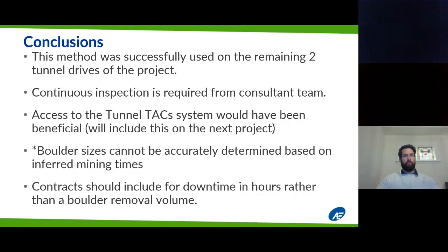Continuous inspection is required from the consultant team. Like I said before, we did have to have a site representative in the tunnel at all times. Access to the tunnel tax system would have been beneficial. The tax system is just the computer system that the TBM operator sees, and it has all the information on it. If we had had, call it, read-only viewing rights to this, it would have probably alleviated the need for us to have a representative in the tunnel at all times. So I think we will definitely include this on the next projects.